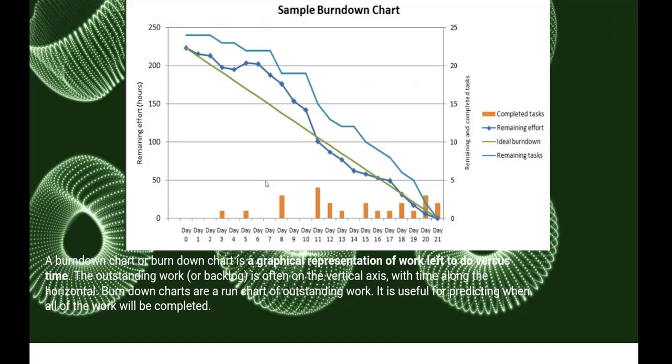And so after a week, you can have some estimation of how much work we are doing each day as a team. After that, you can make it an average, and then you can predict how much work we will do in the next week, right? It's called velocity. That means how the team is performing, and you can predict based on that. Yeah. So in the burn down chart, we will know how much work is left to do, right?